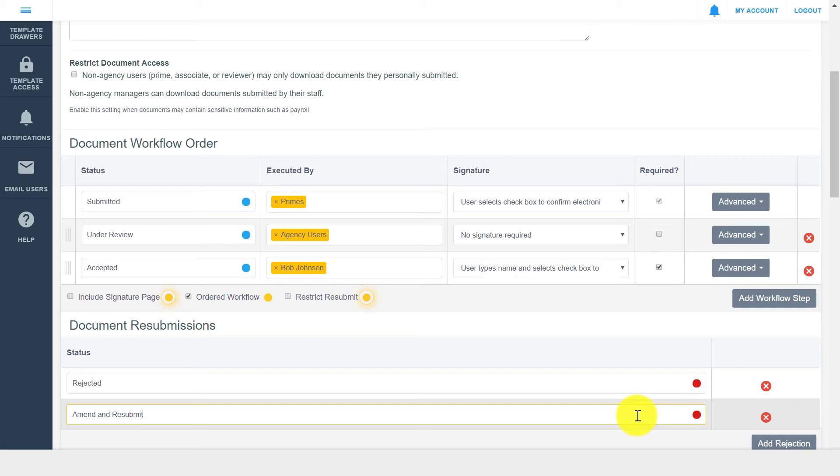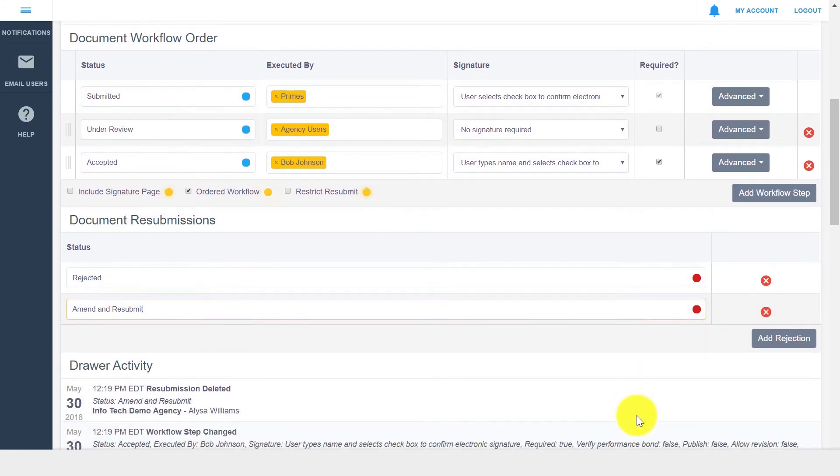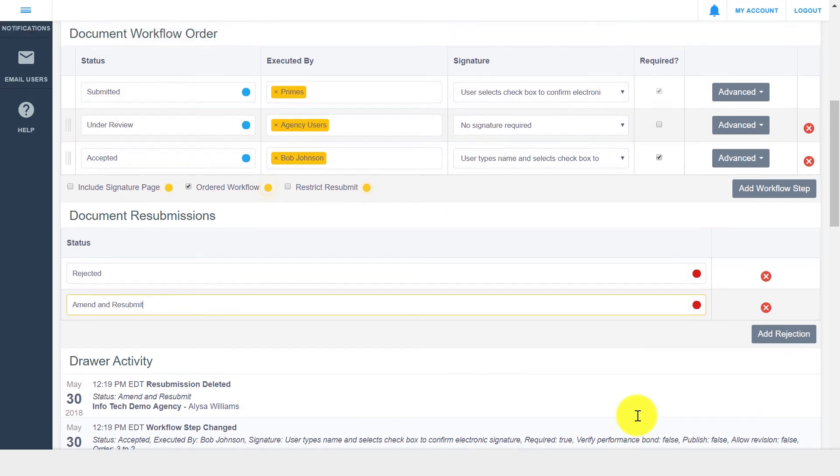Something to note is that drawer setup can be updated at any time, and any changes are reflected in the drawer's activity log. If you do make changes to a drawer's workflow, existing documents will pick up the changes after the current workflow step. After you make all necessary changes on the drawer setup page, you can click Save.